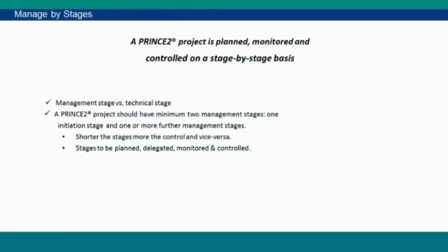Okay, so management stages are where I am planning, planning for development, planning for testing, planning for designing, and technical stages are where I am doing technical work. Okay, so I need to manage. So the principle is that the project is planned, monitored and controlled on a stage by stage basis. So planning I need to do for all stages, I need to monitor all the stages, I need to control all the stages. This is called managed by stages. If this is a designing stage, a development stage, or a testing stage, I need to plan, monitor and control.